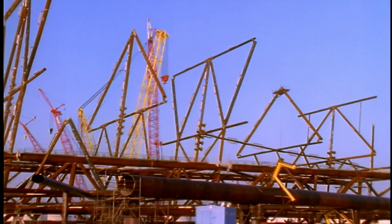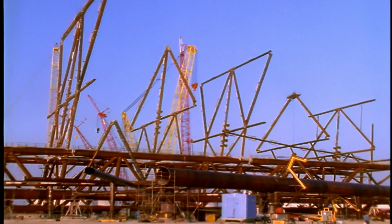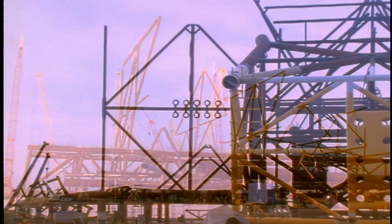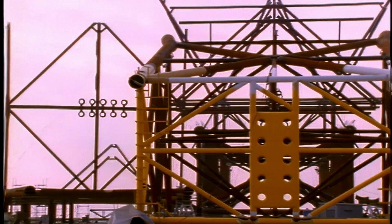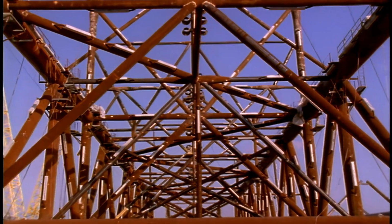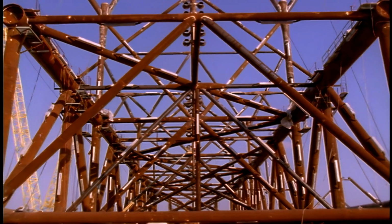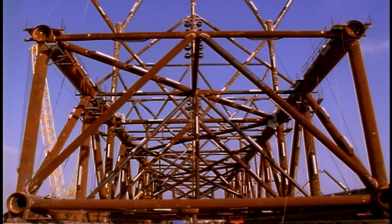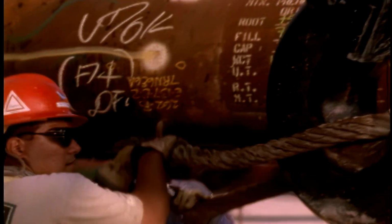May 1997. Shell Offshore's Spirit platform jacket proceeds on an aggressive fabrication schedule at Aker Gulf Marine's yard in Ingleside, Texas. To be installed in 723 feet of water, the structure's final form was shaped by an integrated team of designers, fabricators, and installation engineers.